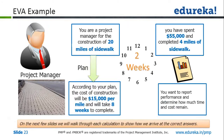We have a quick example to understand that. Suppose you are the project manager for construction of 20 miles of sidewalk. According to your original estimation, the cost of construction will be $15,000 per mile and it will take eight weeks to complete. You start working on it, and after two weeks you reach a checkpoint and need to do the health check. You realize that you have completed four miles of sidewalk and spent $55,000 in completing that work. Now we need to see how we are doing — are we on track in terms of scope and time or not?